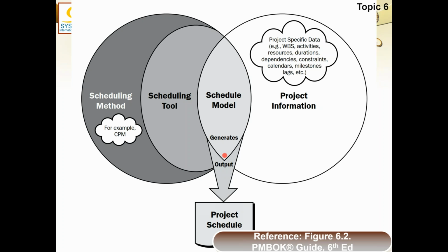And between change requests, the whole process of configuration and version control of various instances will happen. Between two change requests, there could be many schedule model instances which are created. All of them are recorded, but the final shape is always called the baseline.